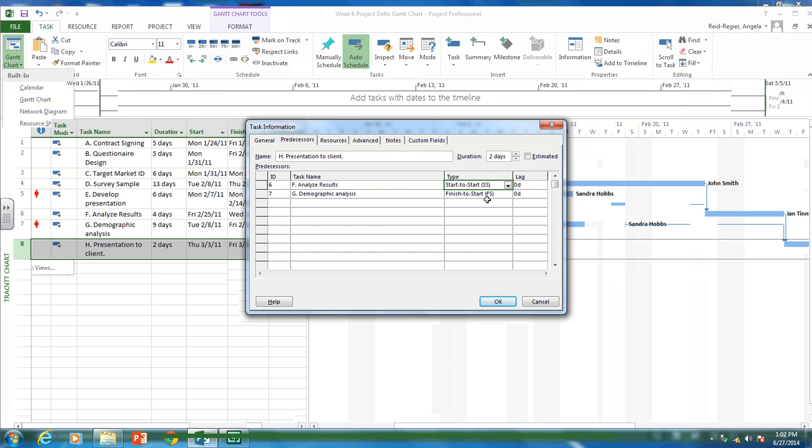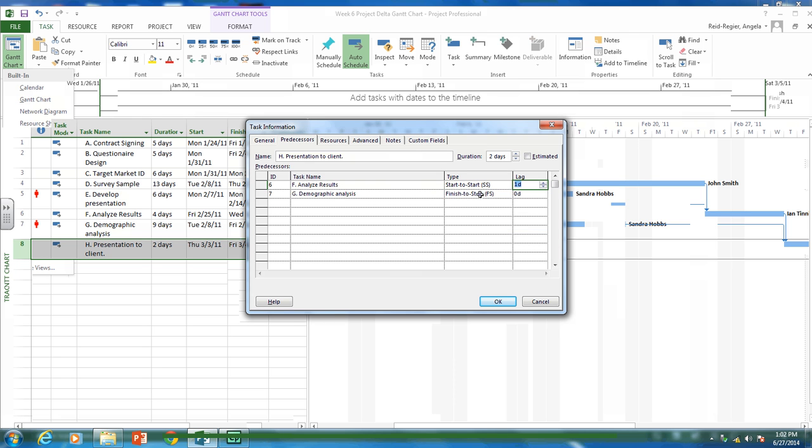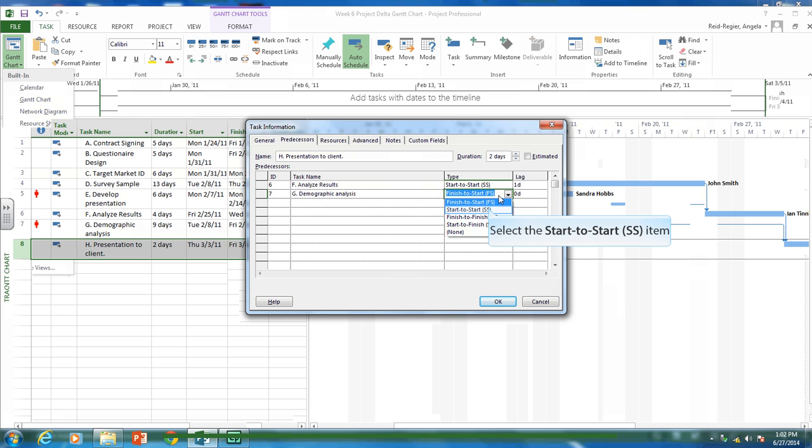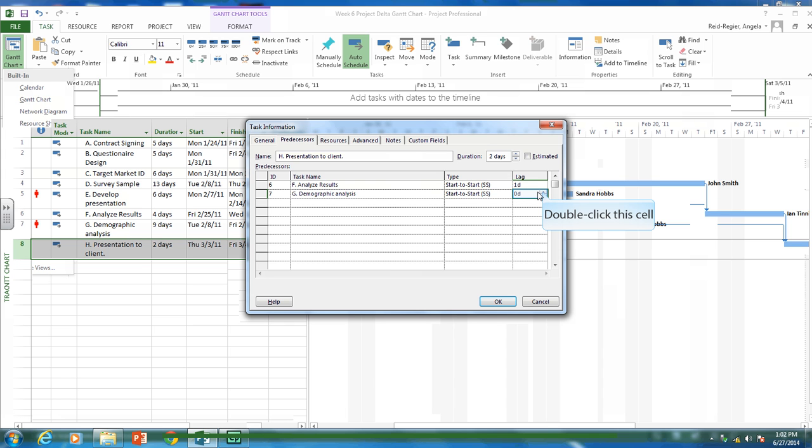So I can start making the presentation once they've started analyzing the results. So let's give them, it takes four days to analyze results. So let's say we can start making the presentation once they've done about one day's worth of work on analyzing the results. And same thing for demographic analysis. We don't have to wait till they're completely done this activity. So once they've started, maybe they're about halfway done. So five days into the nine day activity and we can start making our presentation.